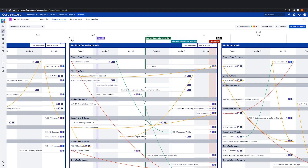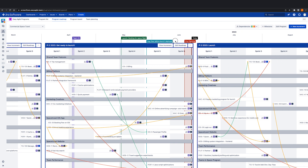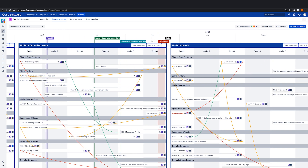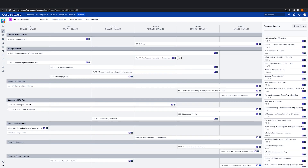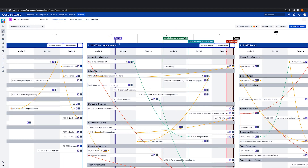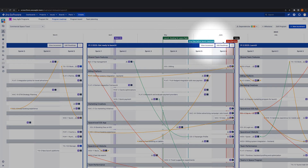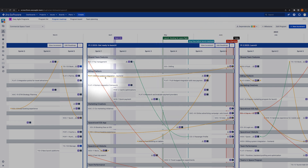Before we finish up, there's one last view in Easy Agile Programs, and that's the program roadmap. It's a holistic overview of all program increments scheduled on a timeline, and it's really helpful to plan future increments by scheduling features or epics. Just like on the program board, we can clearly see milestones that represent external dependencies or deliverables.